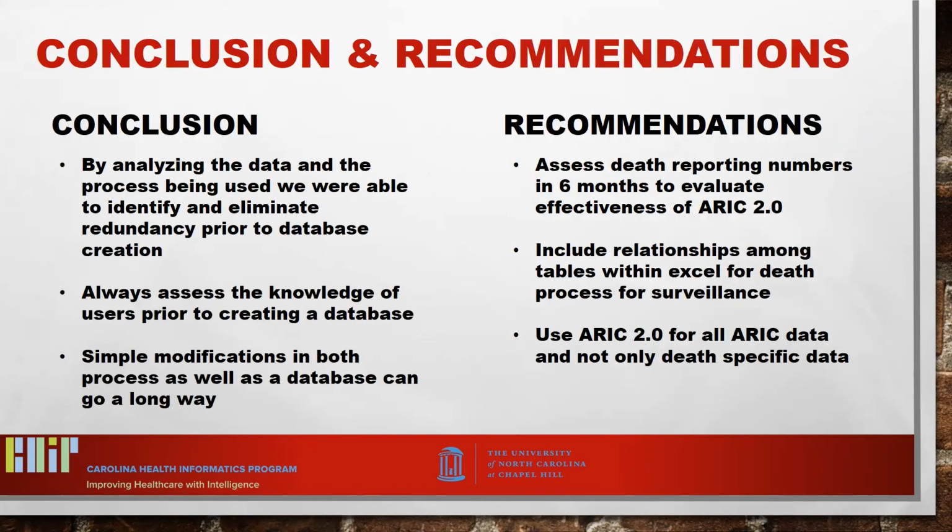And then for conclusions and recommendations, by analyzing the data and the process being used, we were able to identify and eliminate redundancy prior to even the database creation, which told us that much of our issue was within our process and not really specific to the spreadsheets that were in use. Another thing that we had learned was, again, always assess the knowledge of users prior to creating a database. We had what was called a scope creep, and it put us behind a little bit. Luckily, though, it didn't affect any sort of cost or budget. It just affected the project schedule and time and labor.